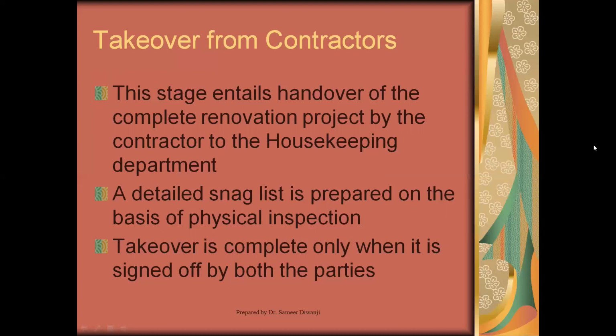So snag list, as we have discussed in the earlier video, is extremely important here. It has to be prepared with great eye for detail, and absolutely any scratch, any patchwork, any chipping of surface or paint or cement or grouting, everything has to be taken into consideration. And this detailed snag list has to be prepared.